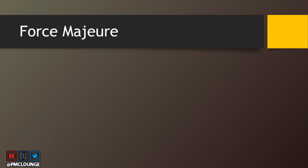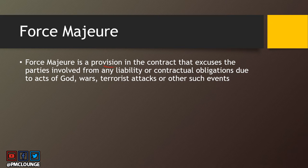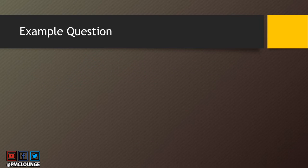Force majeure is basically a provision in the contract. This provision excuses the parties involved from any liability or contractual obligations due to acts of God, wars, terrorist attacks, or other such events. In the event of any natural disaster or a war breaking out, contractual obligations and any kind of liabilities are excused. This provision of excusing is known as force majeure.